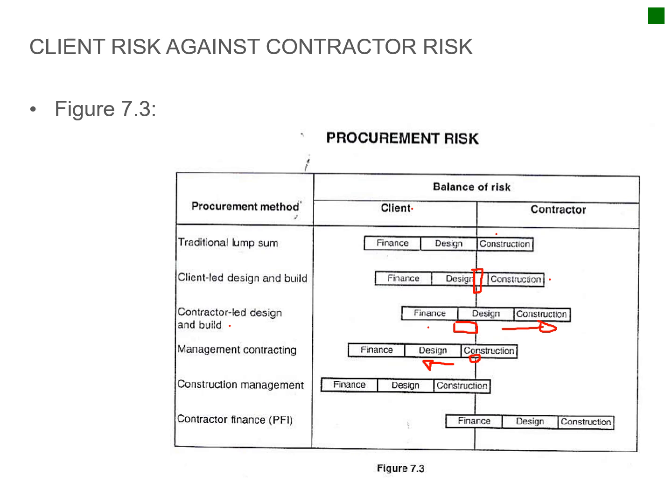Then you have construction management, where the client is very involved in the construction process, where most of the risk actually moves towards the client. Just going back to construction management, this is like developers or so that will fall underneath this type of arrangement.